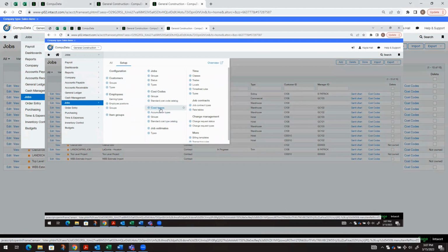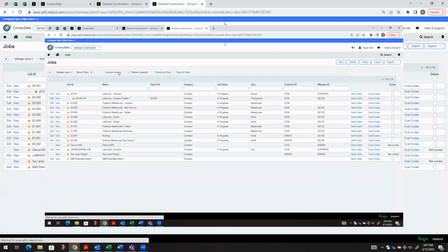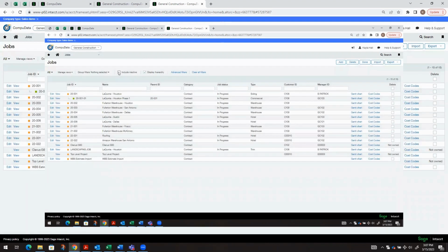As a work breakdown structure best practice, use the dimensions together to build the project hierarchy, which I will show you in just a minute. The project is independent of tasks or cost types, but the tasks are unique to a specific project. And cost types depend on the existence of the project and task dimensions. The uniqueness of cost type is bound to a specific project and task, meaning you cannot select a cost type without first identifying the project and the task in that project.